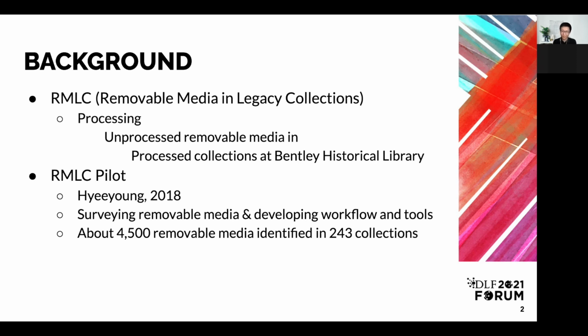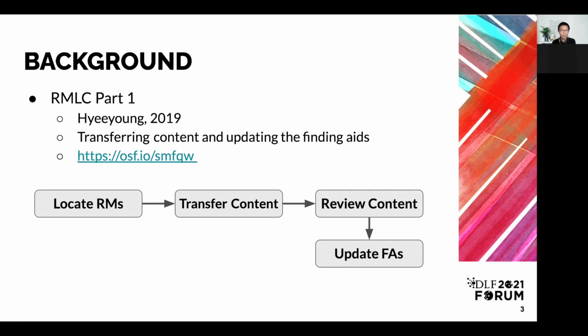So, to process unprocessed removable media in processed collections, I joined Bentley as a project archivist in 2018. I structured RMLC to have three phases: pilot, part 1, and part 2. The pilot focused on getting the number of unprocessed removable media and the last known locations of them. Along the survey, I also developed end-to-end project workflow and tools that assist transferring of removed media content. After the successful pilot, I led a team of 3, me and 2 removable media technicians through part 1's long